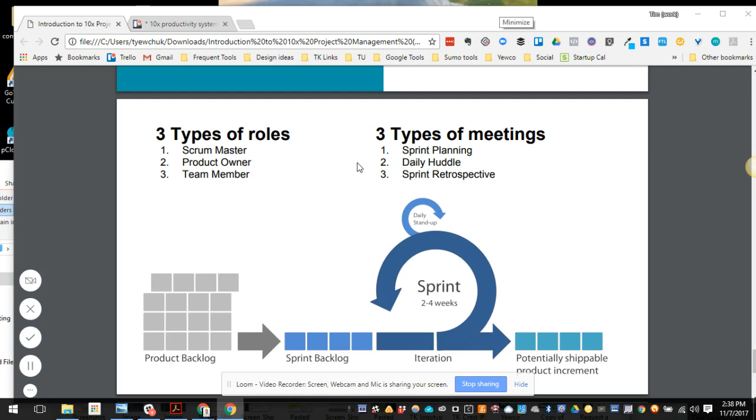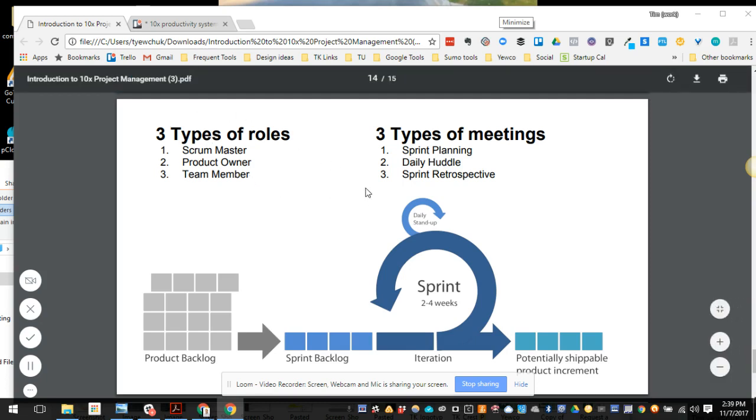And literally, it could be small. You could be looking at, okay, we planned for 30 tasks last week and we got 12 done, and it was way too much, overwhelming. We all wanted to be heroes out of the gate. So let's just take on a lot less. And if we finish that stuff early, then we'll just bring in more and we'll feel really satisfied because we've taken on less. And so that's a very typical improvement idea that we will typically run with early on as well. So those are the 3 types of roles and the 3 types of meetings.